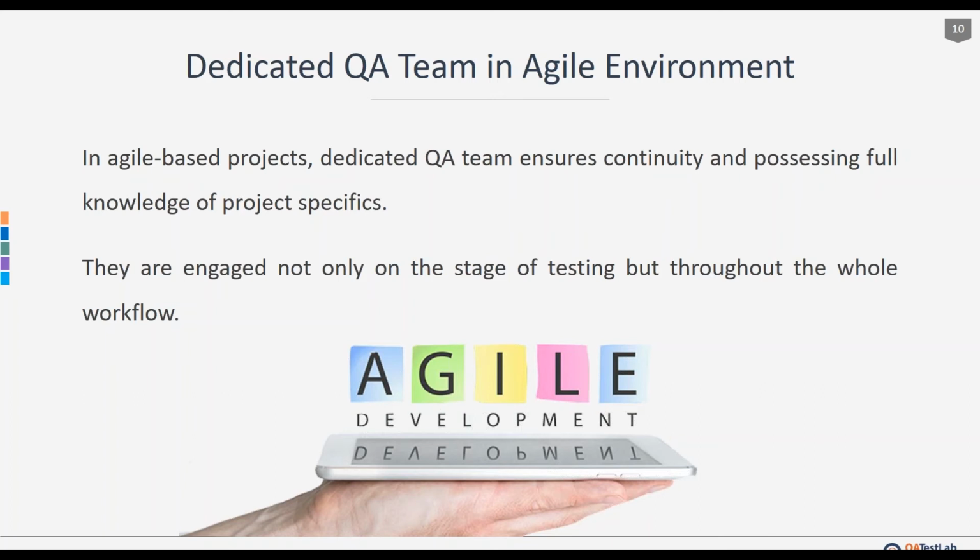Agile teams are cross-functional, and the team members are expected to own the functionalities and to design, develop, test, and deliver them. In such a scenario, the testers cannot maintain their individual identity and focus only on testing. One approach to alleviate this situation could be to bring in the testers only during the testing stage of the sprint. But this approach has many flaws, such as loss of knowledge and continuity, varying team size, and lack of commitment to the sprint goals.